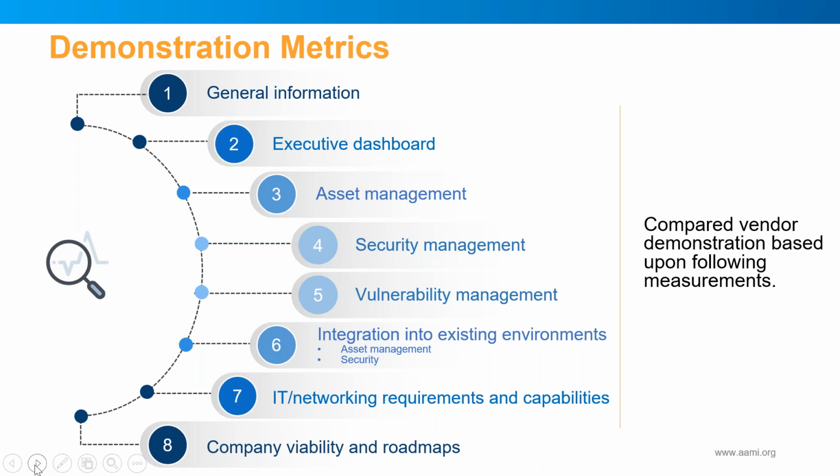So yeah, our key item on this screen is that when we first started this path, we didn't realize how big of a journey it was going to be for us. We thought it would be just a quick make a selection and go on with it. We learned really quickly that we didn't have all the stakeholders at the table. So for any hospital that's going to go down this path and is looking to implement this type of technology in your organization, I urge your clinical engineering and healthcare technology management departments to work quickly with your information security departments and your networking team.